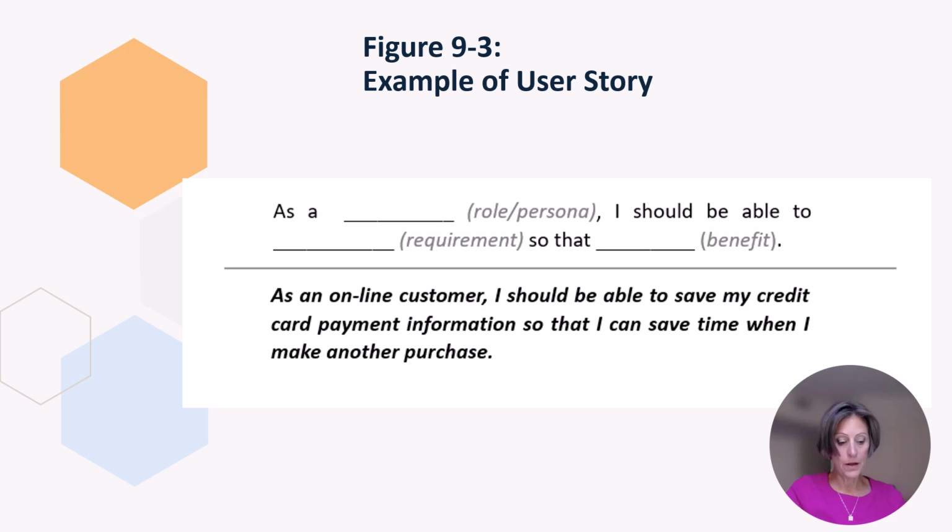Prioritized product backlog. The prioritized product backlog is a requirements document that defines the scope of the product development project by rank ordering the features that are to be delivered. Typically, these features are described by user stories with specific requirements associated with other artifacts in Scrum, such as story points, acceptance criteria, burn down charts. User stories follow a prescribed format that allow the development team to determine the amount and type of work necessary to create the deliverable. See Figure 9.3 for an example of a user story.